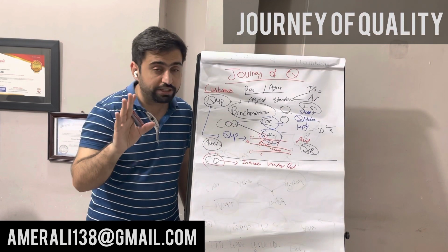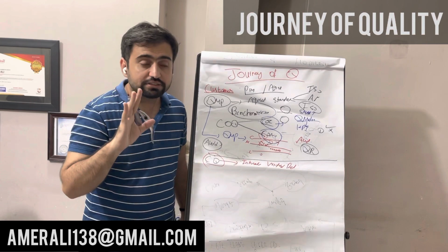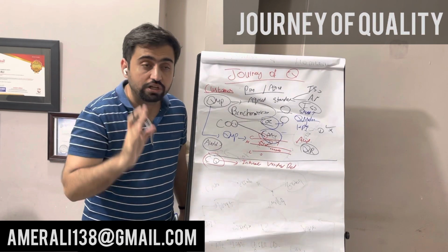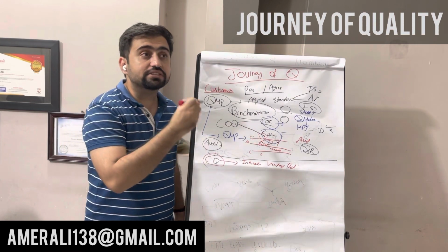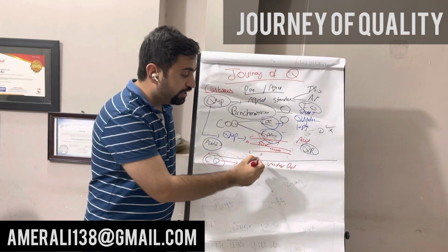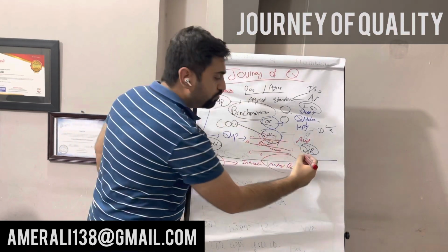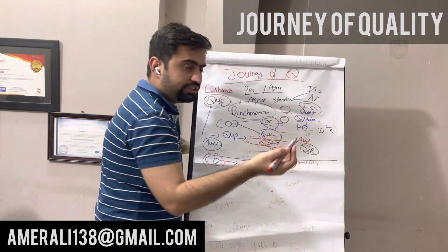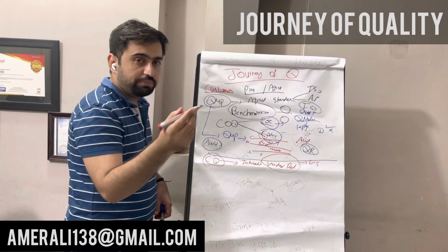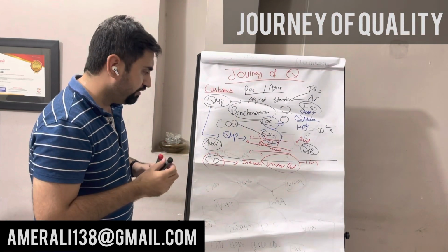This does not mean that a deliverable has been accepted by the customer. This does not mean the deliverable is right. The only thing it means is that it meets the quality standards. So we call it a verified deliverable. Then it goes to validate scope, where the customer checks it and finds out whether it meets or not, and that is basically the journey of the deliverable I've already shared with you.